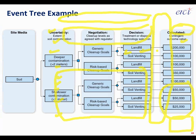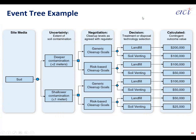The next example is an event tree. We used to call these decision trees, but today we find practical value in identifying different branching outcomes separated by uncertainties (random outcomes), negotiations (where we work with a regulator with lots of influence over the final outcome), and decisions (where we can pick from alternatives). Separating uncertainties from negotiations and from decisions is good practice. When we conflate and confuse them, we run into big trouble. Uncertainties need to be very far apart from negotiations, which in turn need to be very far apart from decisions — that's the best practice.